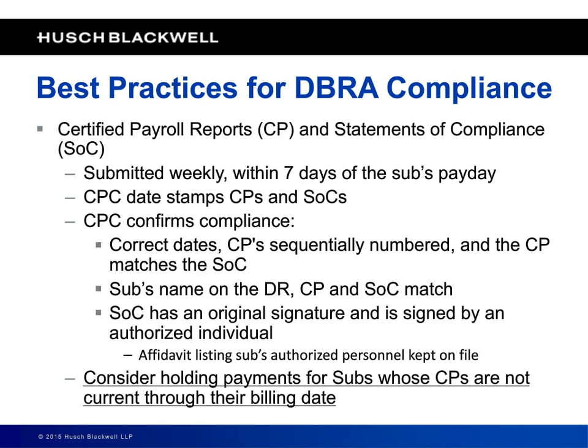Compare the daily record to the certified payroll. Are the same people listed? Is everyone listed on one, listed on the other? Do the hours match up? Are the wages being properly paid? Is it according to the scale? Are the classifications the same between the two records? All the things like that.